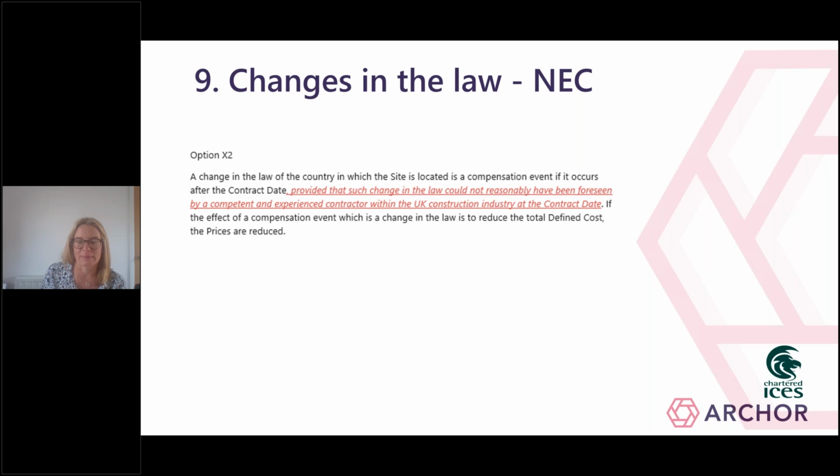The next slide that I will now come on to is in relation to changes in the law. The basis upon which the party who takes the risk for change in the law is often amended from the standard form position. The NEC standard forms have a specified date where the risk for changes in law shifts from the contractor to the client in the standard form. And in the NEC, it's the contract date that is relevant. And as a result of the risk shifting to the client, the employer will then be liable for the cost and time implications of any change which is necessitated as a result of a change in law.